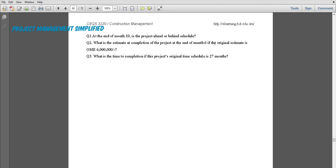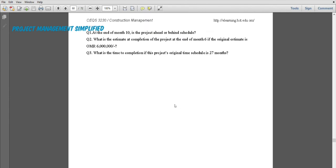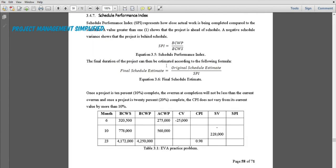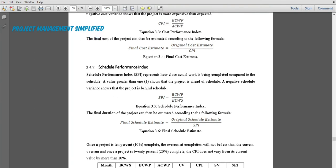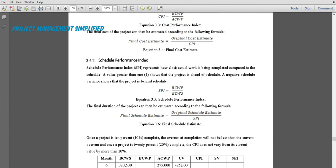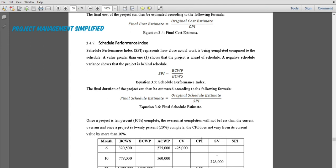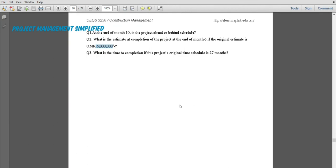What is the estimated cost at completion at the end of month 6, if the original estimate is 6 million reals? Since this is about cost, we need the cost at completion formula: original cost estimate divided by CPI. The original estimate of 6 million is already given. We need to determine the CPI from our calculations.